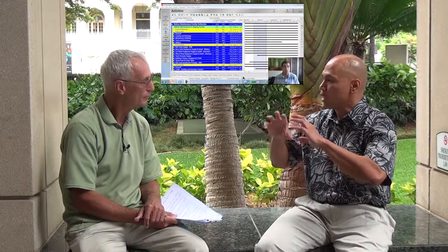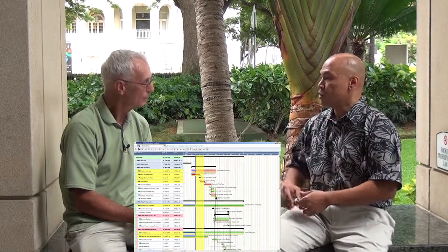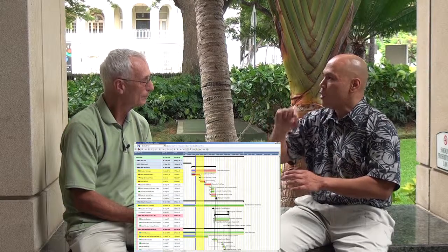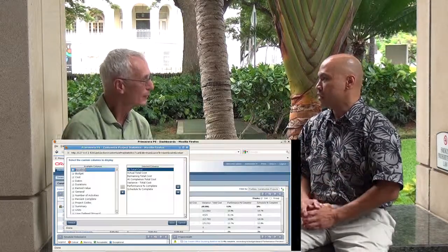Okay. And so that is the repository. So we process all correspondence, all changes, requests for information, schedule submittals, design submittals, review. We have it all recorded in there. So reviewers actually put their comments in there, and you have a ball in court. You get an email blast that the ball's in your court. You got to get in there, review it, and approve it before the next cycle. So we have it all housed in there.